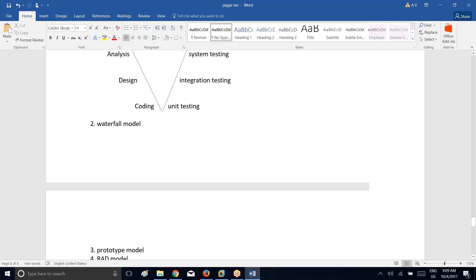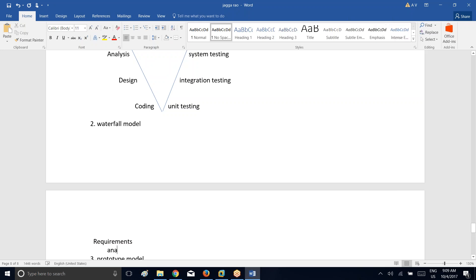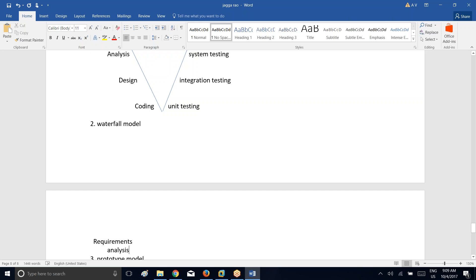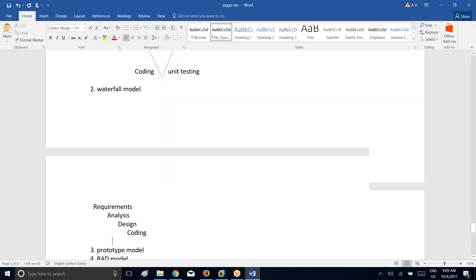In the waterfall model, the development activities and testing activities will start only after completion of the previous activities. First, gather the requirements. After that, do the analysis. Once analysis is done, go ahead and do the design. Once designing is done, go ahead and do the coding. Once coding is completed, go ahead and do the testing. Finally, release and maintain the application.